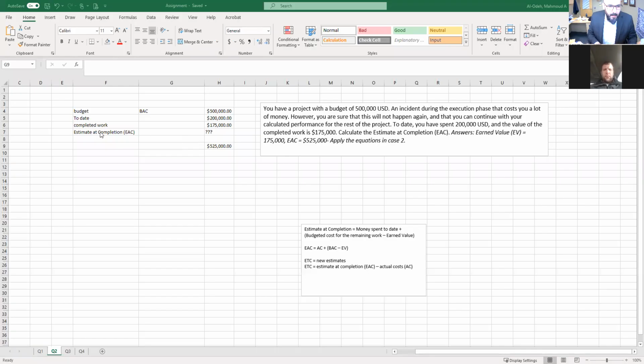All right, now back here. So instead of saying budget, give it an abbreviation, BAC. And they said up to date they have spent 200,000, and that would be what? That would be the actual cost. And for completed work, that would be the earned value. That's the value of the completed work, not the actual cost. The actual cost is 200, but the earned value is 175. Now let's apply this equation here.